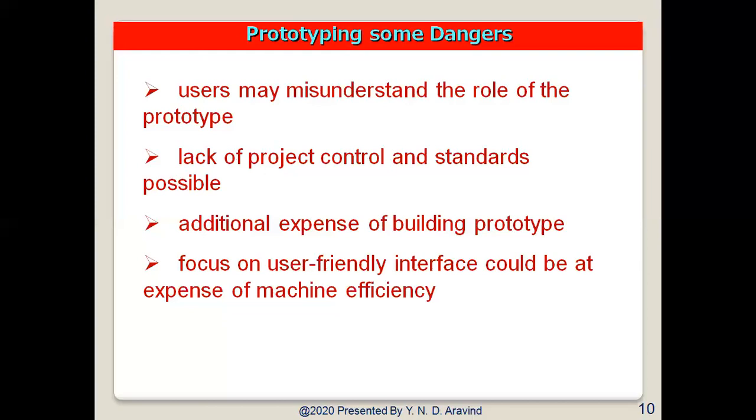We can go for prototyping when the objectives are not clear, whereas in the waterfall model, the objectives need to be clear. Here, if the objectives are not clear, then we can go for prototyping. As time passes, based on the requirements, we can change. So initially, there is no need for having the complete objectives. Here pressure exists for immediate implementation of something. Since it is a prototype, we cannot take so much time for just creating a model. So when there is an immediate need for that particular product, then we need to go for the prototype model.